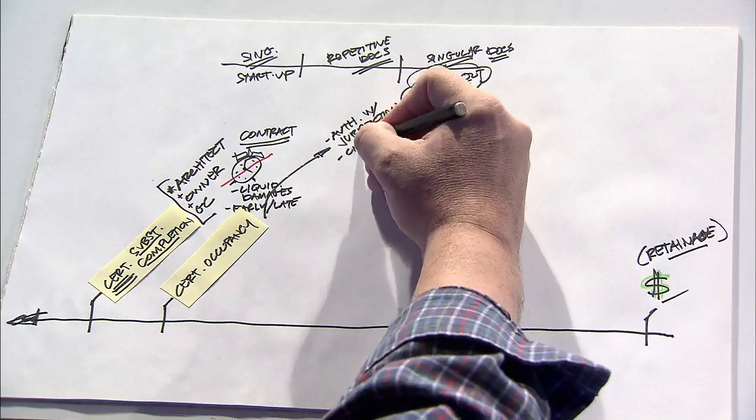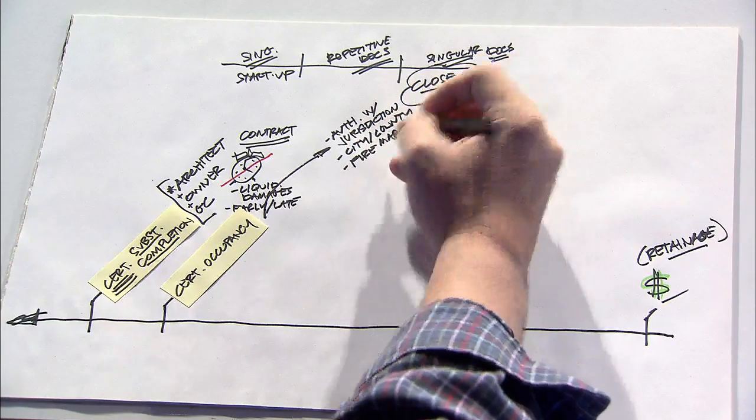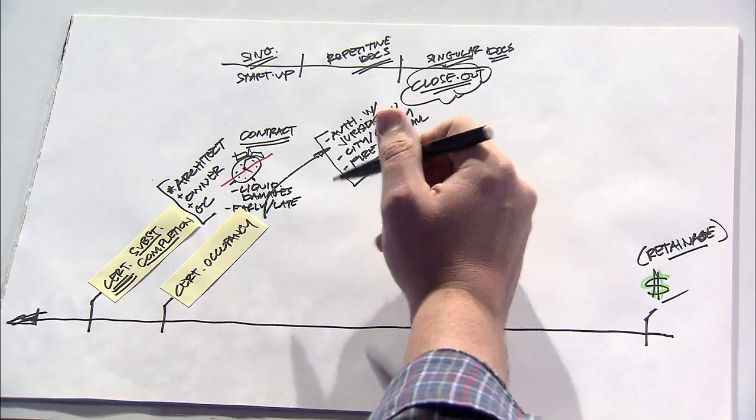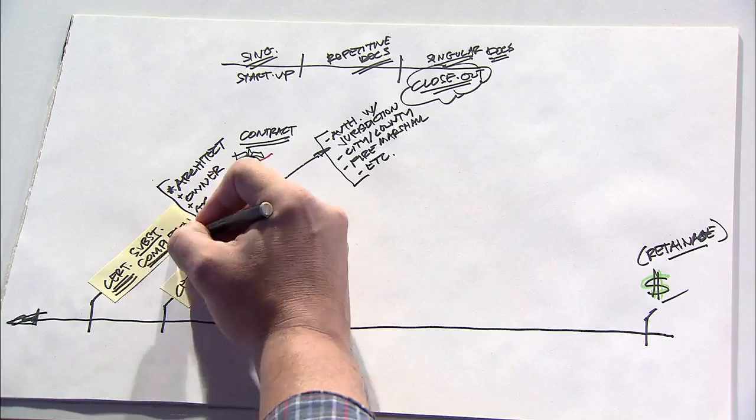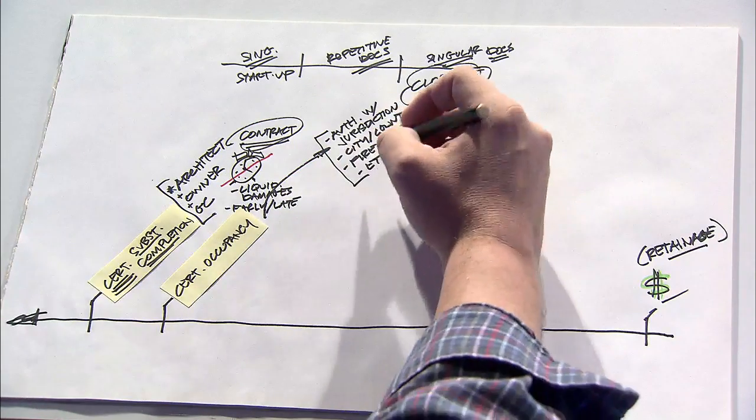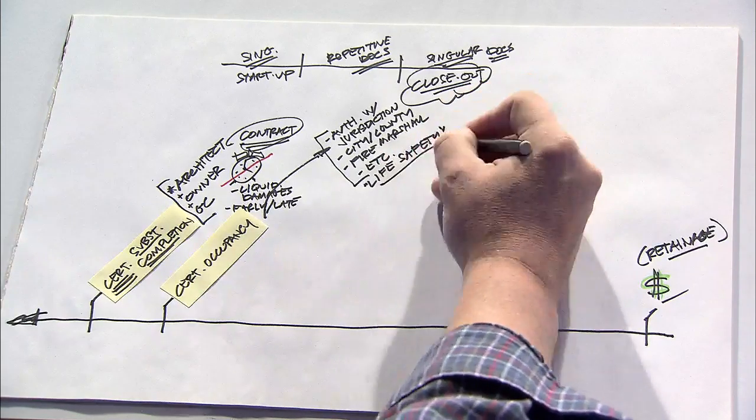The primary way is the Certificate of Occupancy is issued by the authority with jurisdiction, and this would typically be a city or a county. In some cases, it could be the fire marshal or someone else, but usually is issued by a public official. And the primary difference is that substantial completion is based on contractual scope, and the Certificate of Occupancy is based on life safety issues for the public.